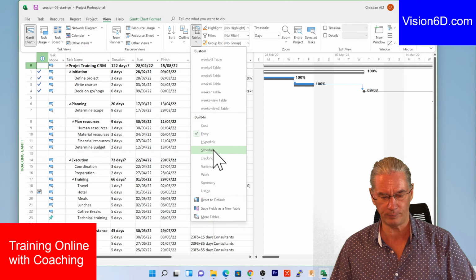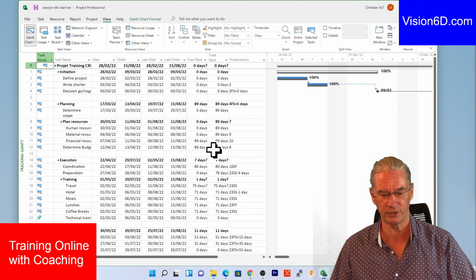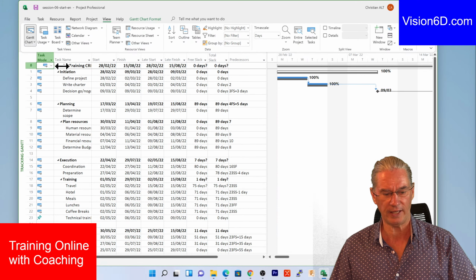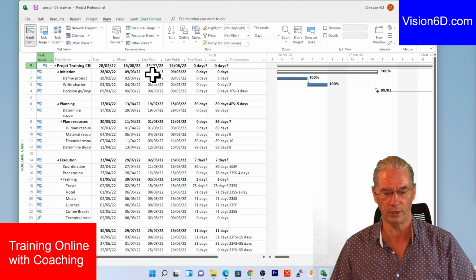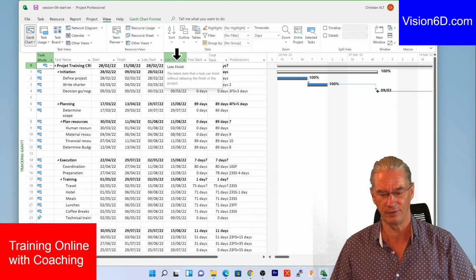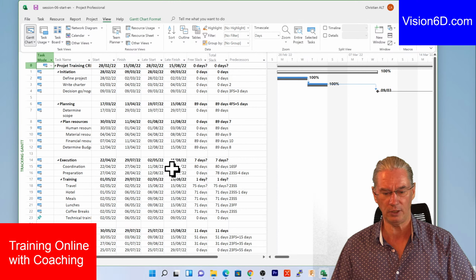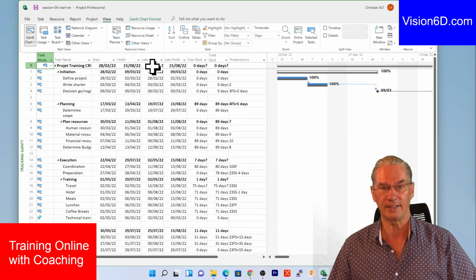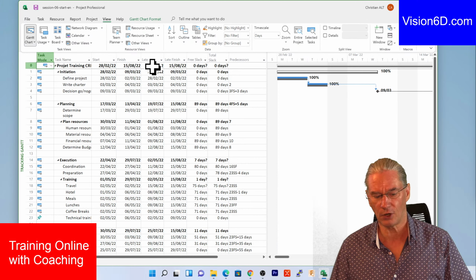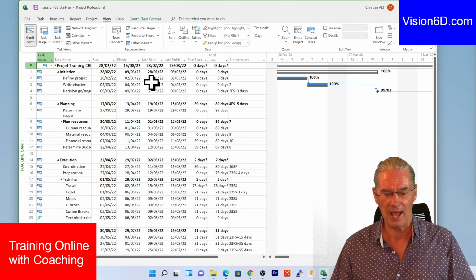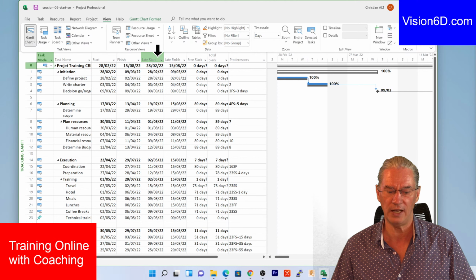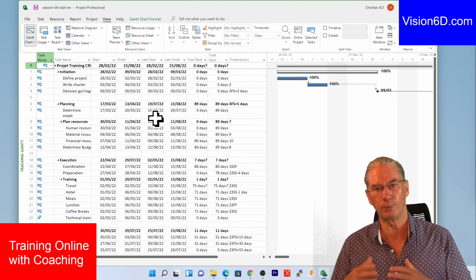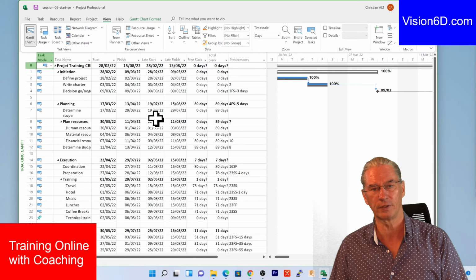If, for example, I take the schedule table, you will see that we have the task, start and finish date, and we have new columns, which are the late start and late finish. What does it mean? It means that I could start a certain task at the latest date defined in late start without putting the deadline of the project in danger.